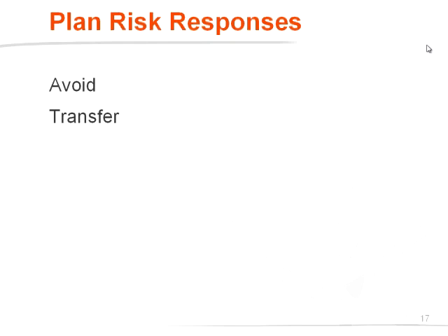Yeah, but let's make absolutely clear, when you transfer a risk, the risk still exists. The risk is still here. The risk can still affect your project, but it's someone else's problem. Yeah, but perhaps it's not related to my core capabilities in my organization, and I give it to somebody who is experienced in handling such risks. Okay. For example, you just pay for an insurance in many cases to transfer risk. It's part of your daily life.